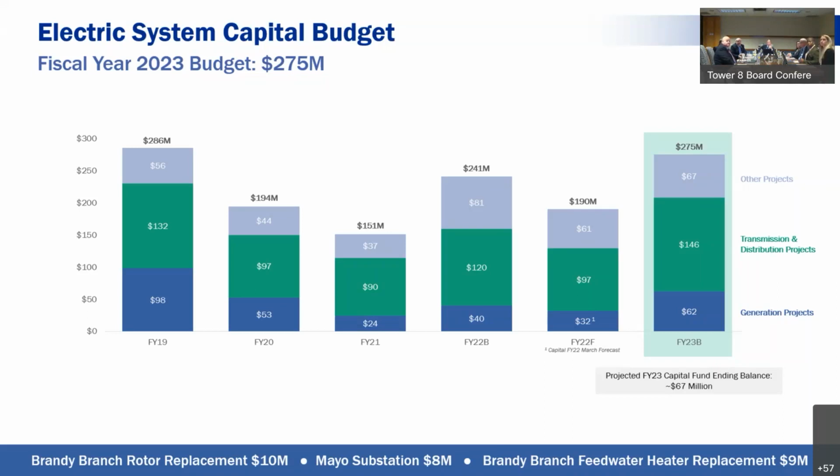Yeah, I think we have not had a specific problem on a whole yet, but we're starting to see more of them. There's a couple of examples on the water side where we've got some pumps that have been delayed. They've always been very, very long lead time items, and now they're even further out. And a couple of projects where we've got transformers that are delayed. So I suspect that we will see delays and increases, but like Ted said, it'll be more of a project by project basis on how that impacts us.